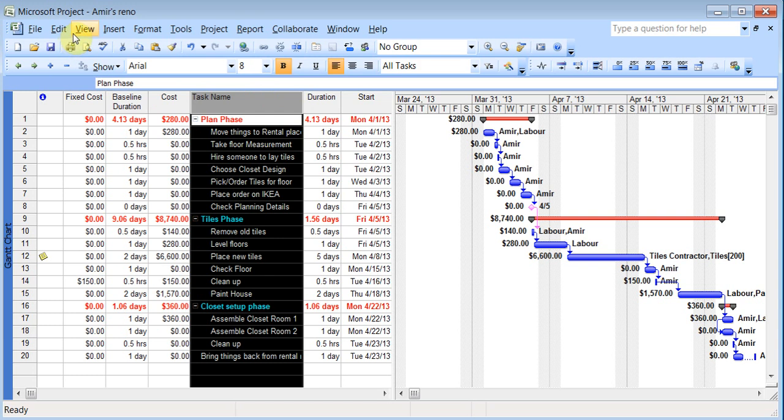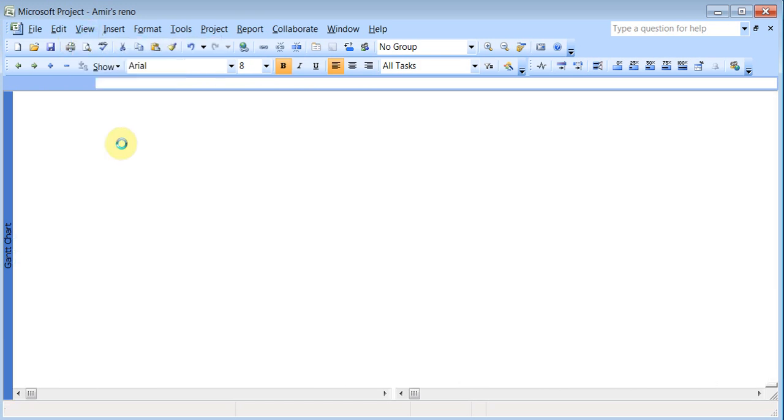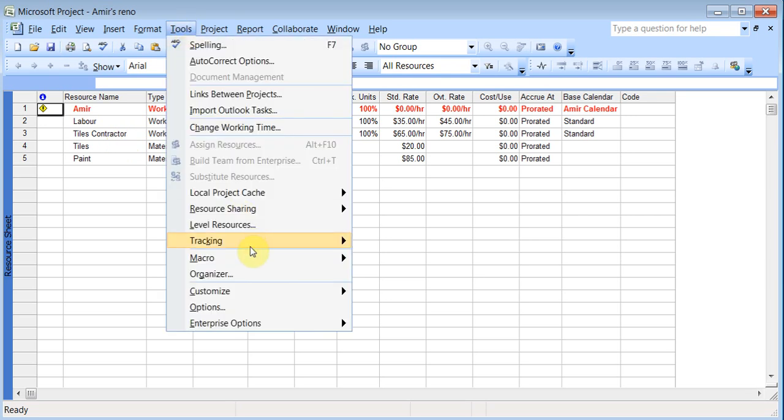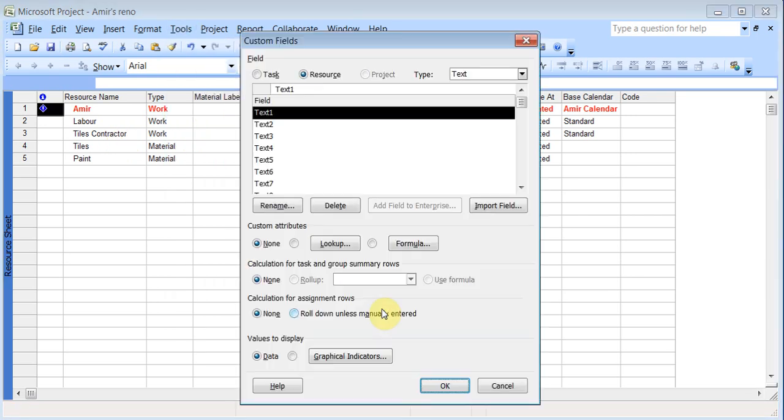Now I'll go to view resource sheet. And I'll do one up here for a cost. Say for example I wanted to figure out that OK, I need to pay 13% taxed on my cost. For example on all my cost. So I can create a new field for that. So I can go to tools, customize fields.